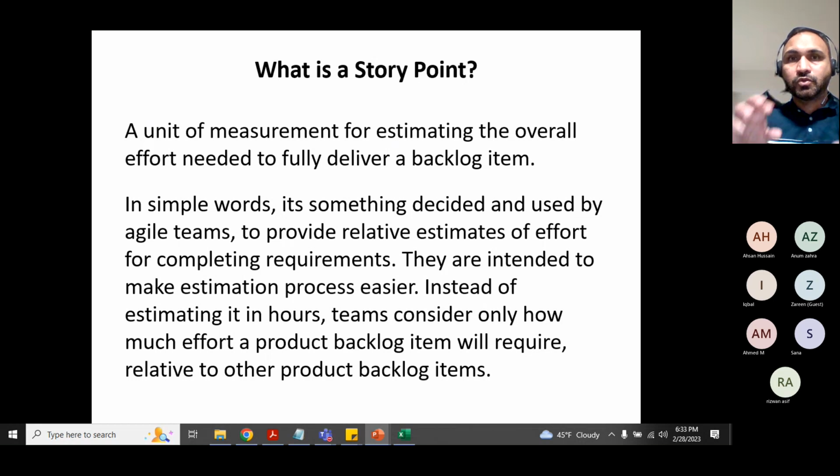First of all, story point or sizing. Sizing is another word that we use. You do sizing and story points on your backlog first, and then prioritize the backlog and then bring it to the sprint. Remember the workflow I explained in the previous classes, right? My point, the whole idea of bringing story points into Scrum practice is to measure somehow and come up with the estimates.